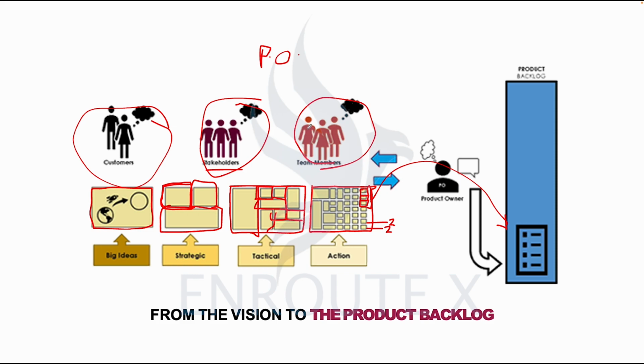That means each person could work on 4 stories per sprint, right? Meaning each person could work on 2 stories, 2 story points rather. Pardon me, I make reference to story points, not numbers of stories. 2 story points per week of a 2-week sprint. I hope that is clear. So each person, let's assume, could work on 4 story points per sprint. Then it means that the product owner would bring in total work items that would equate to 12 story points.